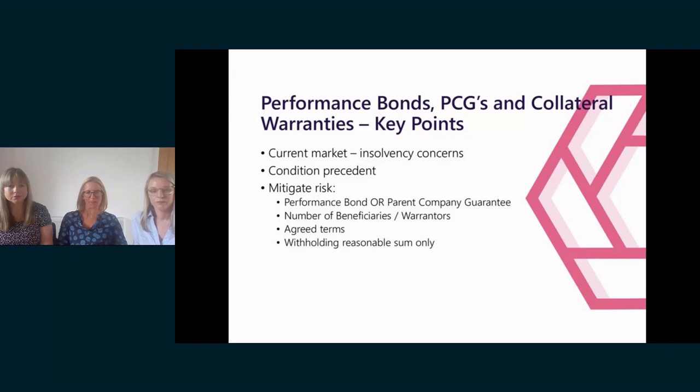than just subcontractors and consultants with responsibility for a material element of the design, which is the traditional position. The key issue for parties responsible for providing these documents is that they're almost always made a condition precedent to payment, and that is particularly problematic when this requires reliance on a third party, so provision of, well, all of them really are reliant on third parties. So if you are the main contractor, again, it is unlikely that this obligation is going to go away. So how can you mitigate this risk and manage it?